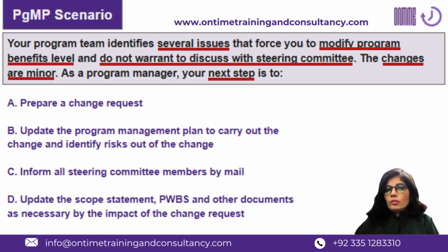And impact analysis could be very broad, could be narrow, depending on the level of change. So impact analysis may include benefits understanding and integration and scope, schedule, quality, resource, budget related aspects, the risk related aspects, the stakeholder related aspect, like how this change is going to impact the program and its associated components.